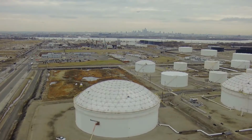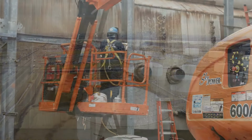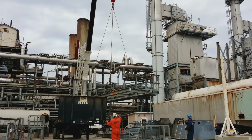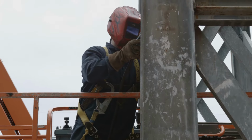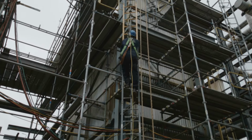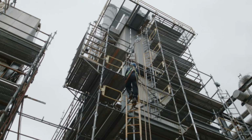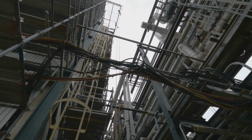Components to be disassembled and re-erected are 24 tractor-trailer loads of piping, a Rentec boiler weighing 400,000 pounds, an economizer weighing 100,000 pounds, a 150-foot tall stack section, 15 superload duct sections, boiler catalyst, an ammonia skid, a fuel gas skid, a chemical building, pipe racks and platforms, a precipitator system, a cooling tower, a collection tube assembly, and a transformer roof section. The duration of this project will be 7 months.